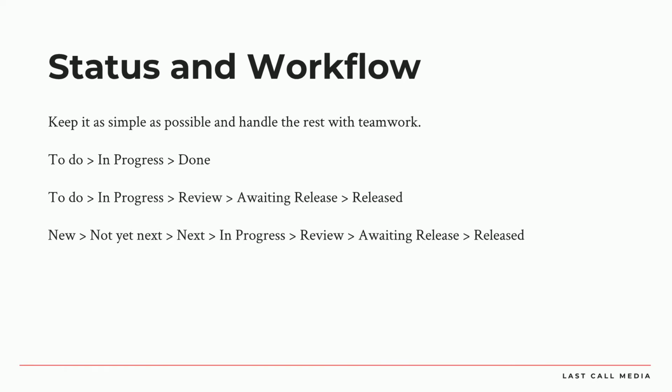But for a team working with multiple teams, so let's say this was a web development project, and each of the teams is doing web development in some way. They're just working on different components of that web development project. Their issues are all working through the same workflow. So it makes sense to keep that in the same project, but then to configure that project for those components that they're focused on. And that's what we're going to jump into.